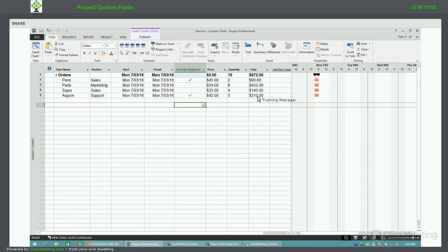If you want to create a custom field, I'm going to create a custom field now. Say I want to create one to indicate whether the task in here is a high-risk task. So we're going to create a column called risk that gives people three choices, high, medium, and low. And then we're going to put in a graphical indicator to indicate if it's a high or a low value that's in there.